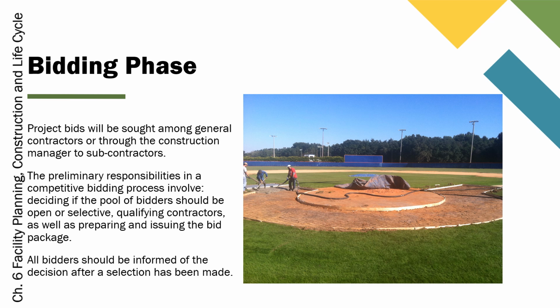Then it's preparing and issuing the bid package. The bid package includes essential documents such as construction drawings, specifications, project schedule, and contract terms. Clear instructions on how to submit the bid, including the required format, deadlines, and any conditions, must also be included.